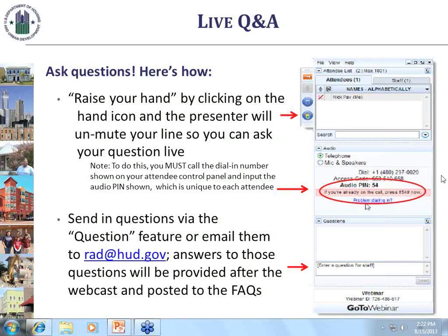You can use reserves, capital funds, operating subsidies for a project, and you don't need HUD's approval to spend up to $100,000 in pre-development by project. But in spending that money, because they're public housing funds, you still have to use public housing procurement rules, which in most cases is small purchase procedures, which is pretty streamlined and simple.